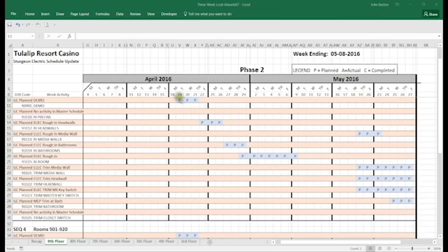And in the general contractor schedule, he had a time allocated, which is what we have up in the legend as planned. So if we were to come in here and we say, well, guess what? We didn't really get there on that day, but we were actually able to get it done on these 3 days, and we finished it on the 3rd day, we would say completed, right? So what we've done is we've said we have an actual date when we started, an actual day we were working, and then the day that we actually completed the work. So we know that we slipped the schedule 1 day here.